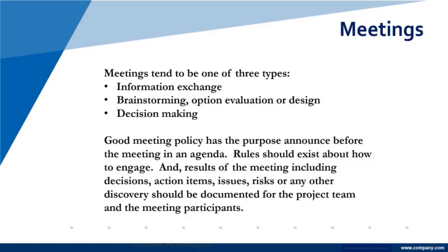So as a project manager, you need to be aware. You are the steward. You have a responsibility to spend the corporate assets well. So if you're spending it, you need to be mindful of it. You need to have expectations set. Agendas are good about that. You can include a lot of things like decisions that we've made, decisions that were made since last time, action items and updates on action items. Things like issues and risks can be discussed.